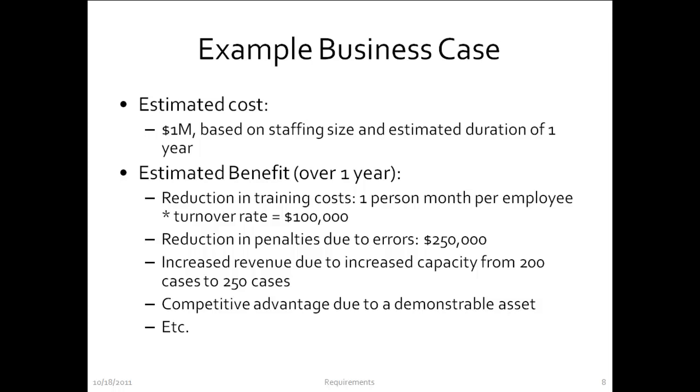Throw in equipment costs. You'll need a development environment, you'll need a test environment, you'll need a deployment environment, you'll need software licenses and things like that. And you can come up with an estimated cost, and we came up with an estimated cost, once again, primarily based on staffing size and the estimated duration of 1 year, of about $1 million.